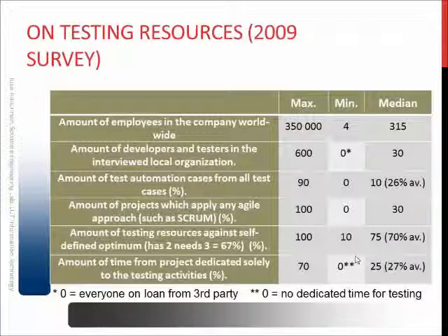Companies actually do that. They do the main development of their main product, for example, a new main version of the operating system, by waterfall approach, simply so that they get all the documentation base and all the other backtrackable stuff in place. But if they are doing something smaller, like adding a feature or doing some small tailoring work to the software, then they are happy to apply agile approach simply because it's more simple and it has smaller overhead.